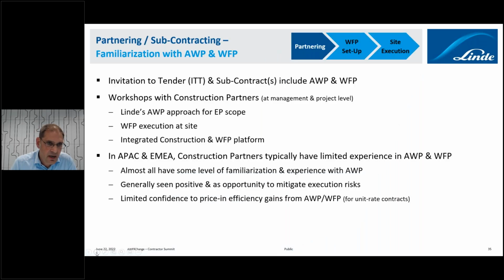So with that in mind, I would like to walk through now the different phases. So similar to this select, define, execute, I've called it here partnering, work phase planning, setup, and site execution. I will walk through these different phases, and first I would like to start here with the partnering. So we include AWP and work phase planning in our invitation to tender and also in our draft and final subcontracts. So this is clearly embedded in it.